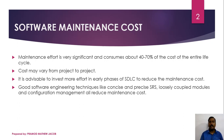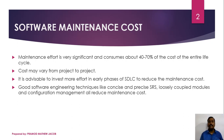It is very difficult to perform maintenance on a software product which doesn't have proper documentation and adequate file resources. Maintenance effort is very significant and contains about 40 to 70 percentage of the cost of the entire software development life cycle. The cost may vary from project to project, but it is advisable to invest more effort in the earlier phases of SDLC to reduce the maintenance cost.